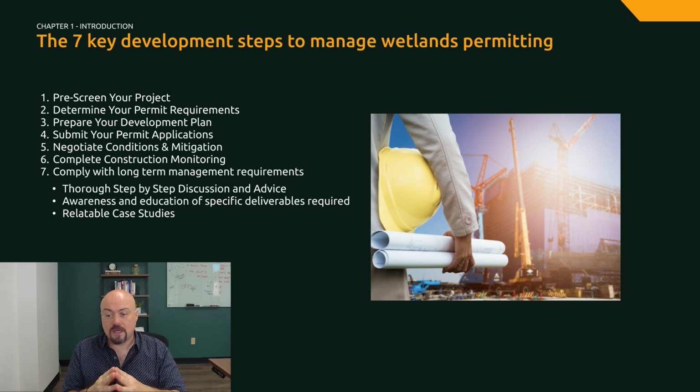The next steps for our process include determining your permit requirements, preparing your development plan, submitting your permit applications, negotiating conditions and mitigation with agencies, completing construction monitoring, and finally, complying with long-term management requirements.